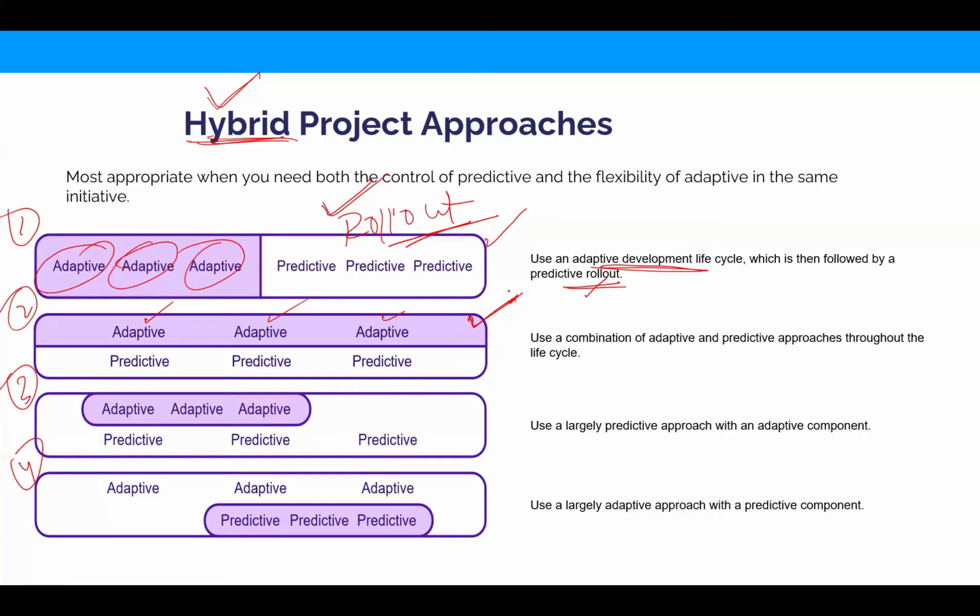For that, we're using Agile at a low level, building the product. But at a high level for the project, we want governance, reporting, budget tracking, we want project timelines, rigid timelines and all. So for that governance, we're using predictive for the overall project with a detailed plan, with a timeline, with a budget, with governance and control. But at a low level, we are letting people flex or change low level requirements and evolve the product.